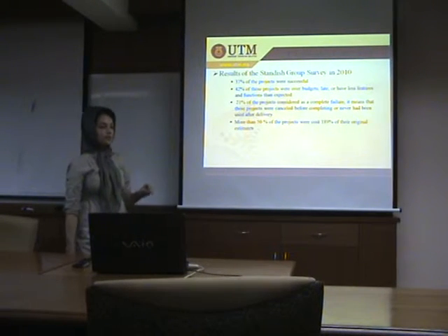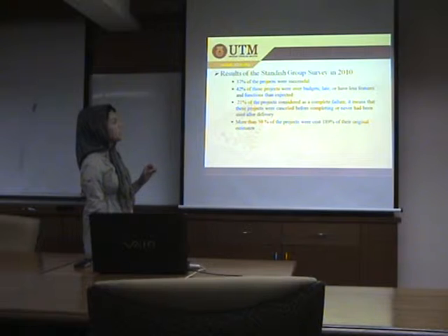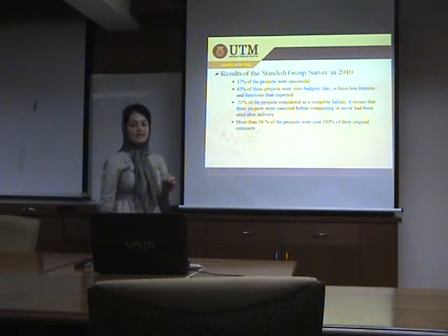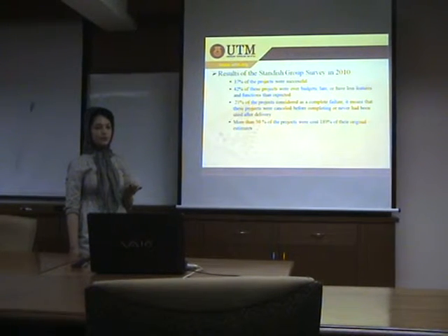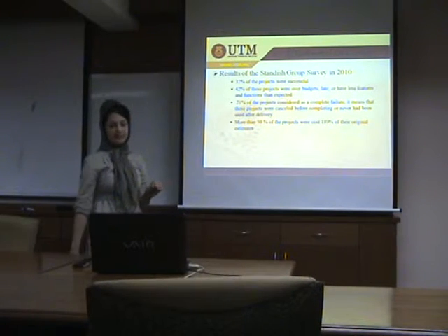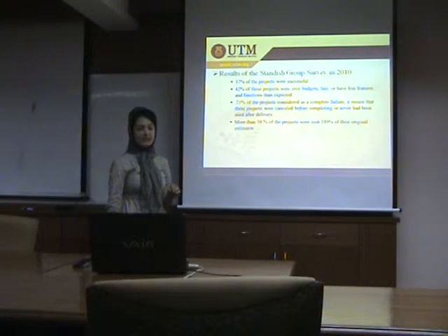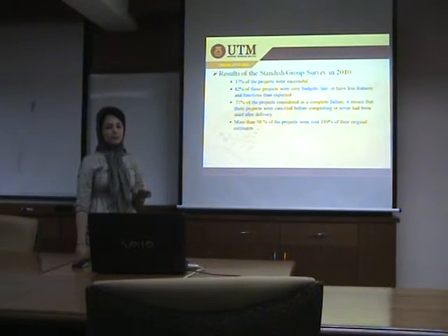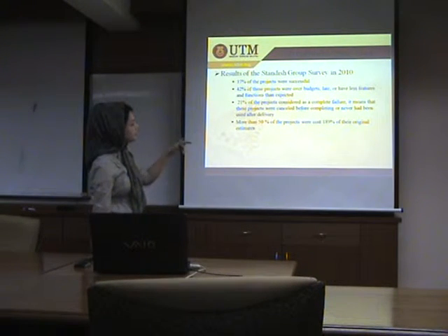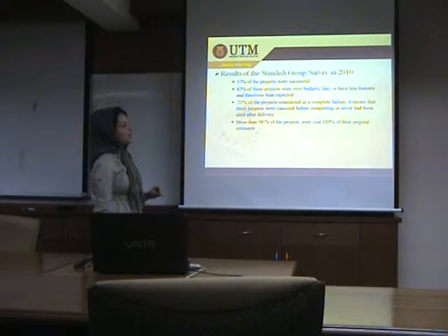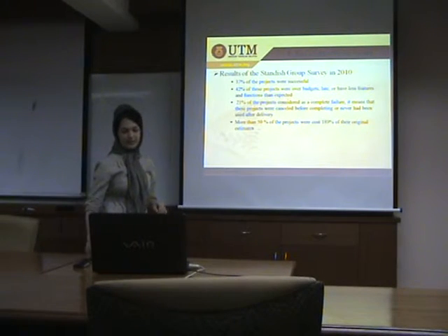According to a Standish Group survey in 2010, just 37% of ERP projects were successful, and 42% of these projects were over budget, late, or had fewer features and functions than expected. And 21% of the projects were considered a complete failure. It means that these projects were cancelled before completing or never used after delivery. And according to another survey, more than 50% of the projects cost 189% of the original estimates.